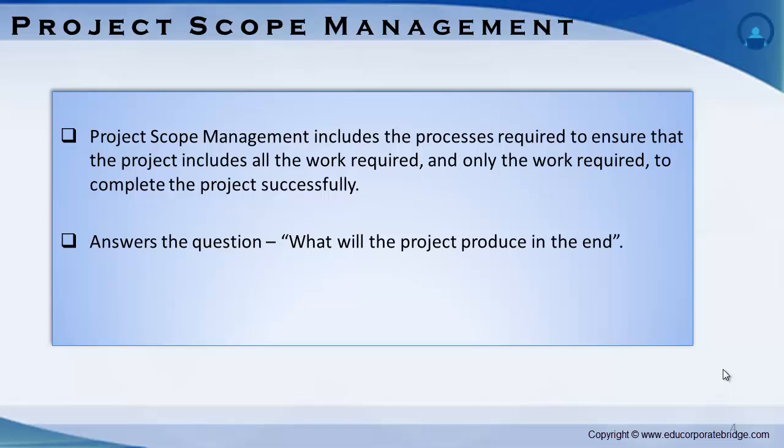Added planning may also include added analysis of an IT system, changes to engineering drawings, and additional purchase requisitions, etc. All these tasks will add to the project's cost and create delays in the schedule. These are the couple of reasons which necessitate scope management.